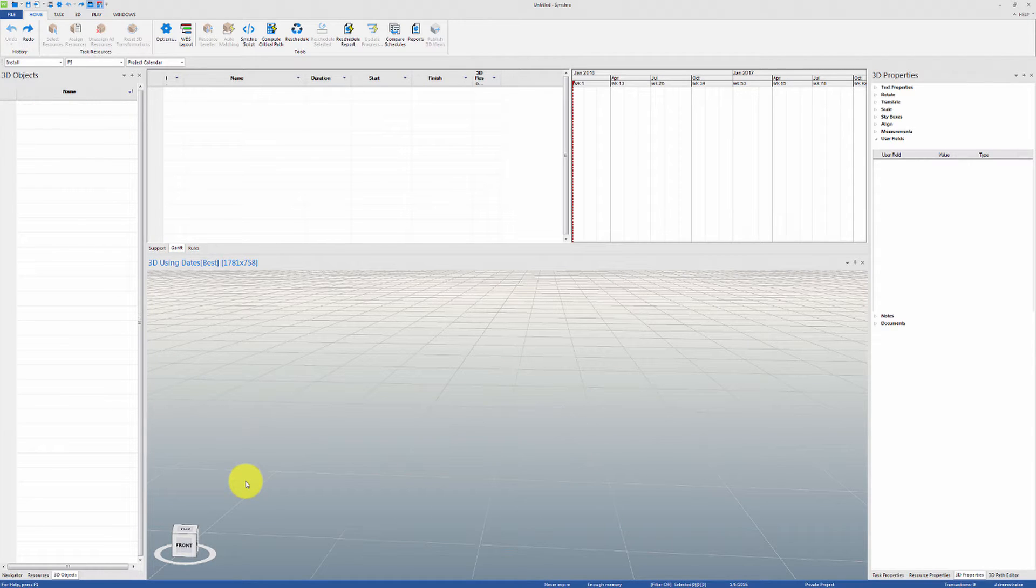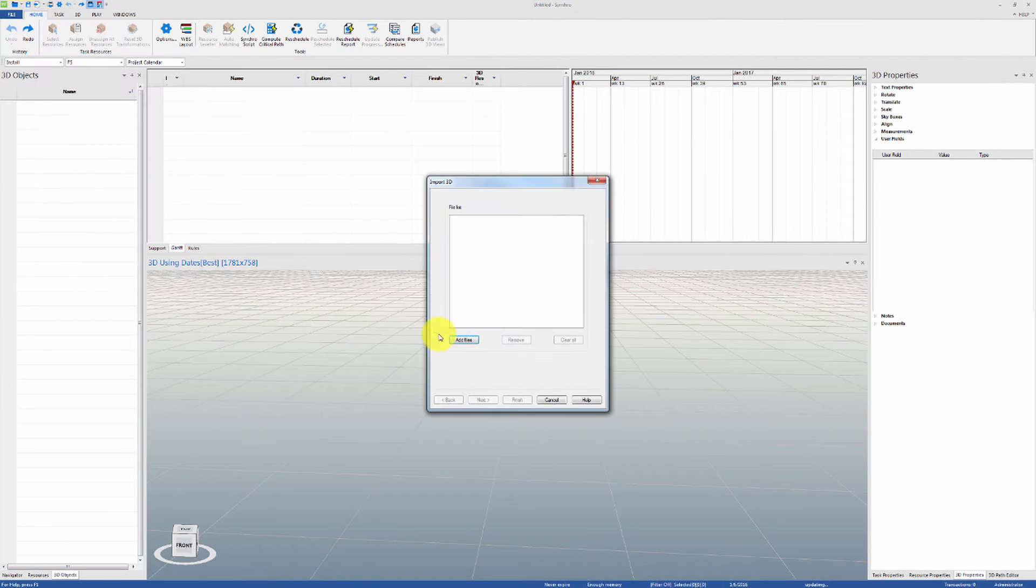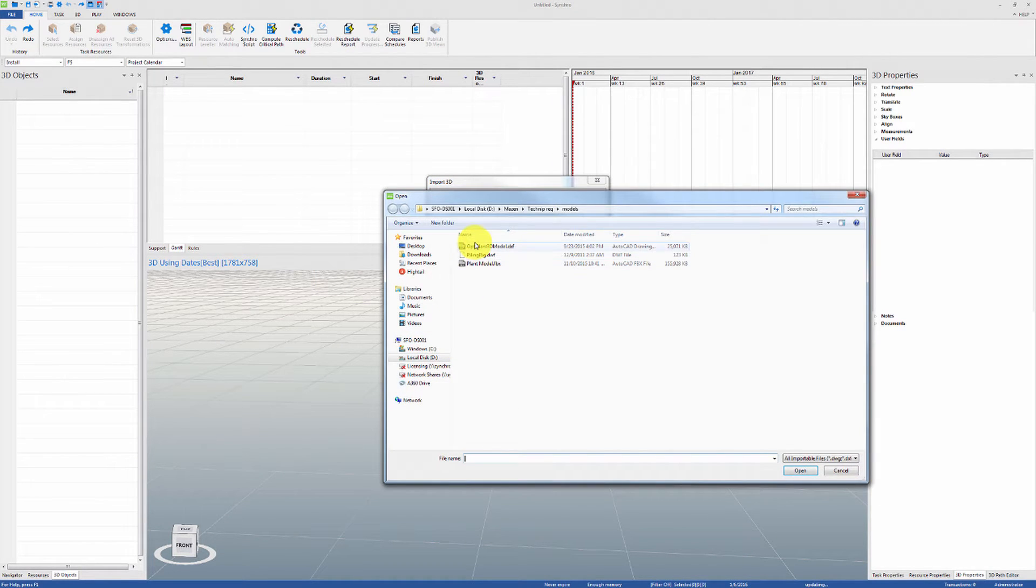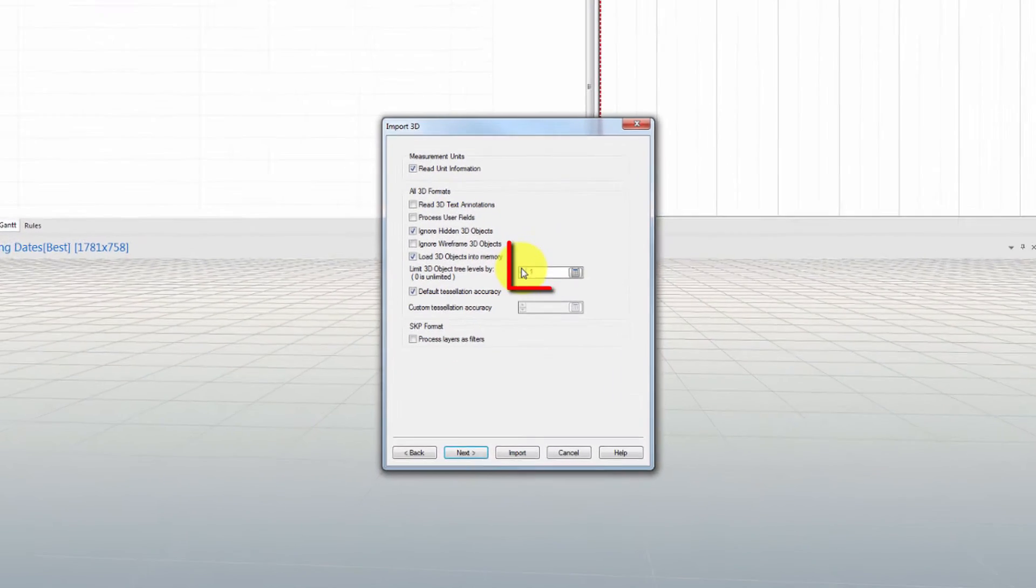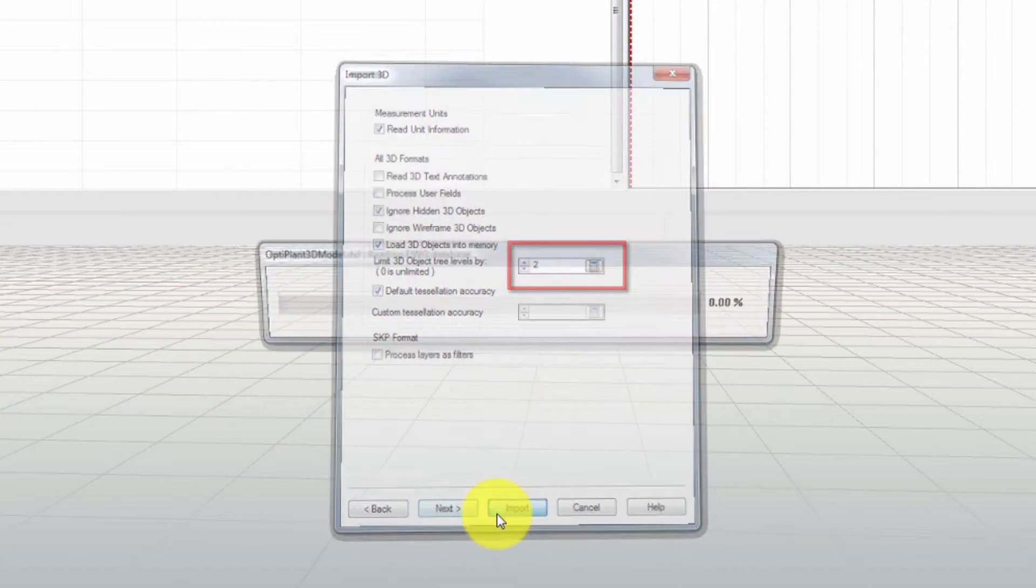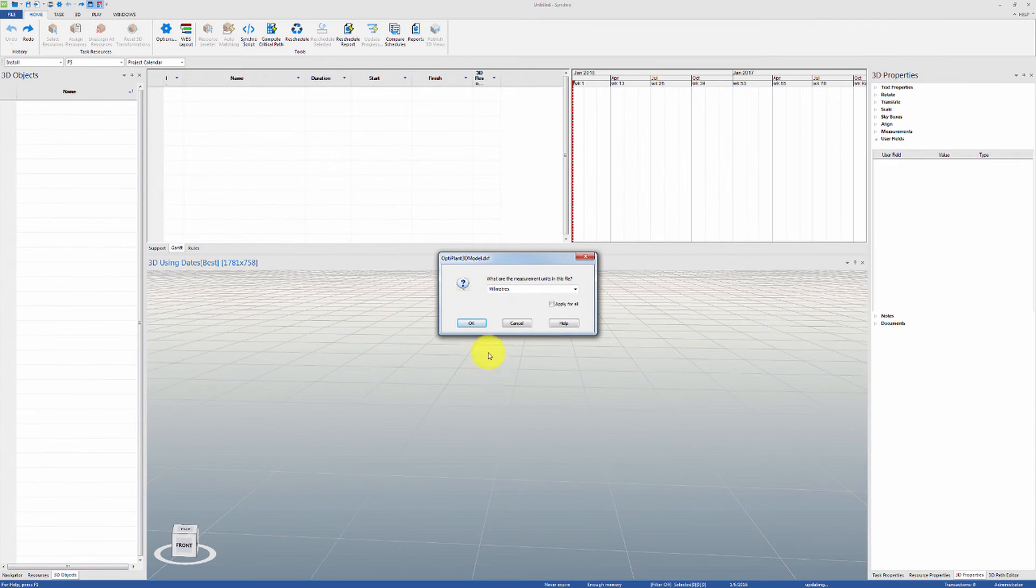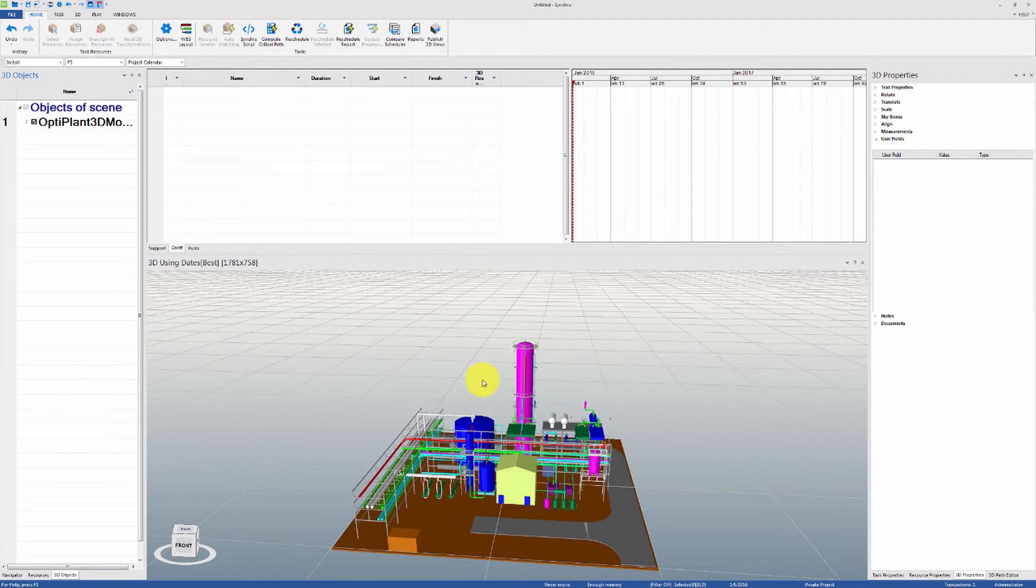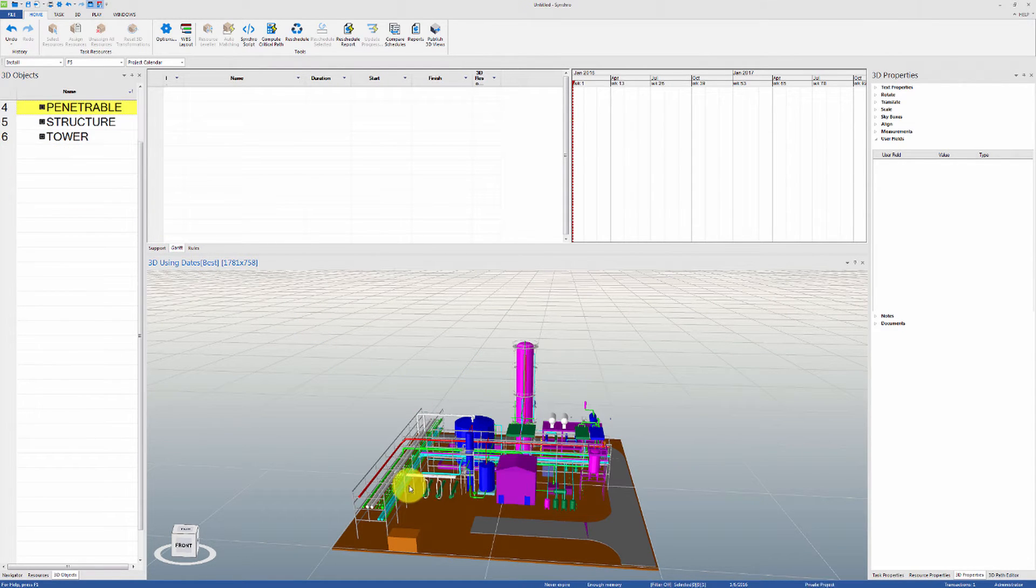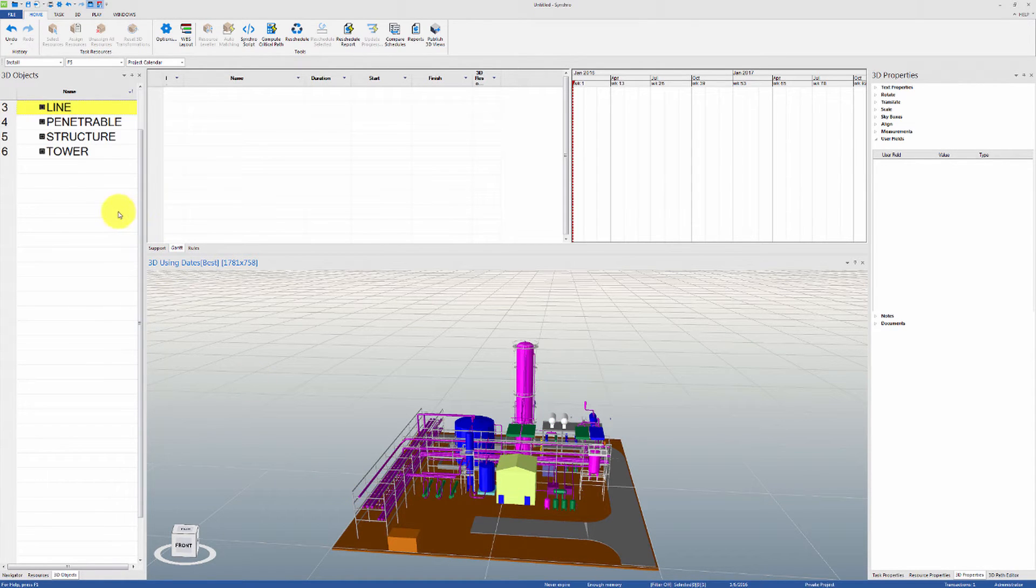Let's undo and try re-importing the same model with a higher limit set on the 3D object's tree levels. This time, let's set the value to 2. You will notice that the 3D objects have been merged according to the categories they belong to. This may be fine for high-level sequencing.